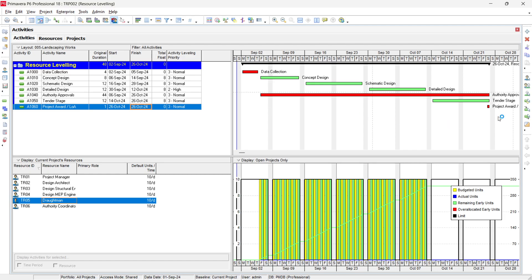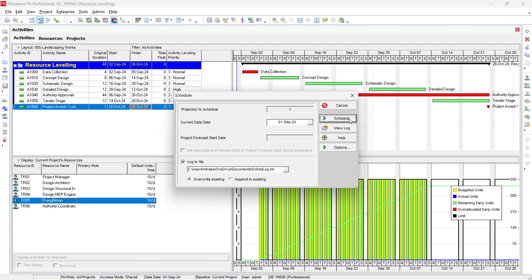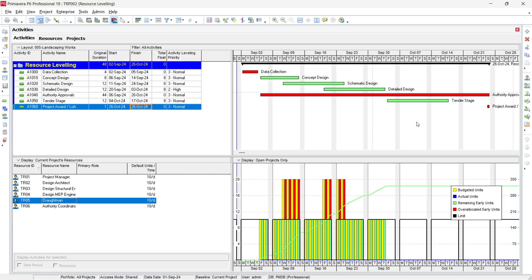To revert back to the original situation, press F9 and reschedule. You can see there is a time period which is the total float. When leveling resources, Primavera makes use of this float to optimize resource allocation — eliminating over-allocation and wastage — so the total float is fully utilized in this case.